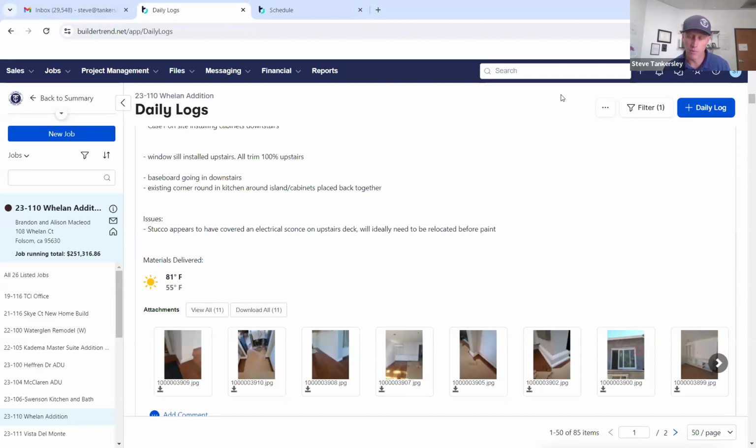Also, there are so many different areas. A big feature that we use is our to-dos and having templates for everything. Instead of resequencing every single job, since they have similarities, we have to-dos for a new home build, let's say, for every single phase of work. We don't have to recreate the wheel every single time. We can just upload a template and follow the checklist, the process, and the SOP for that job. It's a huge time saver.